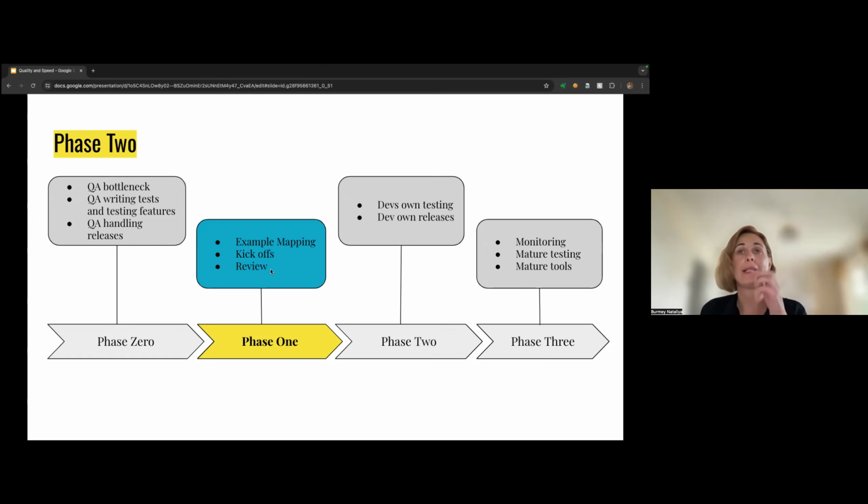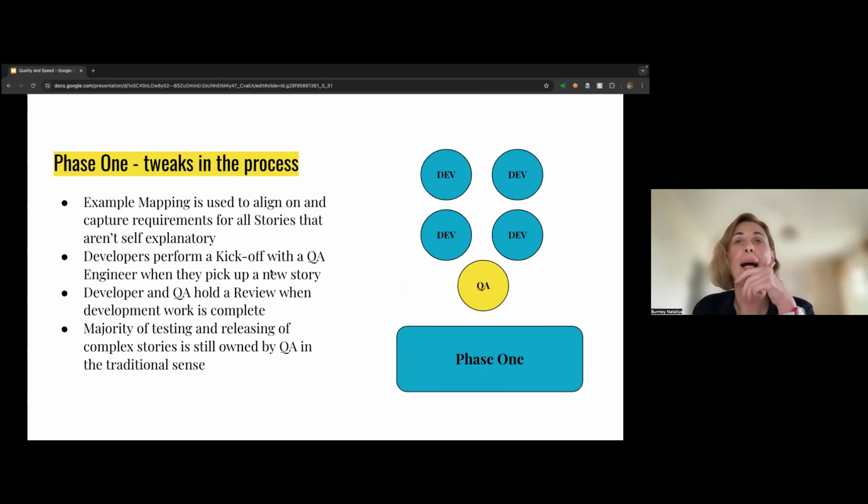So those three things were introduced in phase one. And it was quite easy to say, but obviously each collaboration point where you have to work with developers or teams requires lots of effort. So previously, in phase 0, we had to teach and train people how to run the sessions effectively, how to run kickoffs and reviews effectively. A very simple thing we learned after a month was that people were not doing kickoffs and reviews because they simply did not know what it meant.